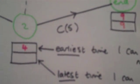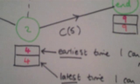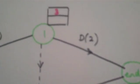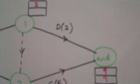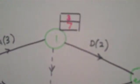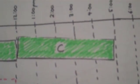Now I'm going to do a backward pass. It takes 9 hours to finish. The latest I can leave node 2 — since C takes 5 hours — is time 4. If I leave an hour later, the whole project is delayed. For node 1, D only takes 2 hours and I must finish by 9, so the latest I can leave node 1 is time 7.